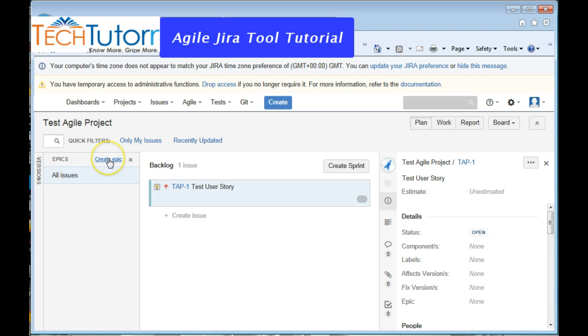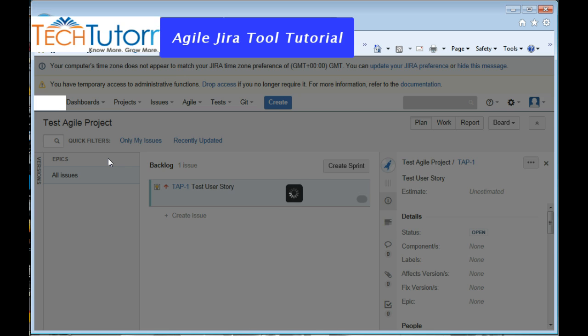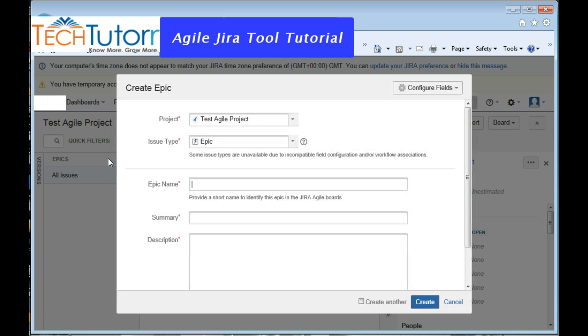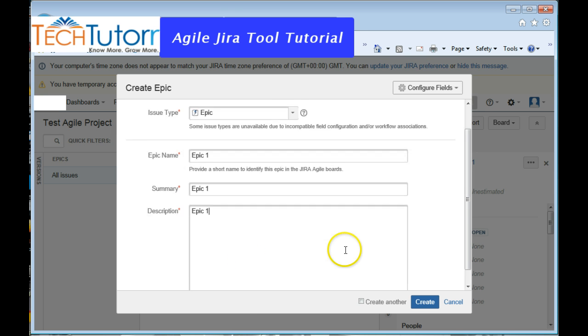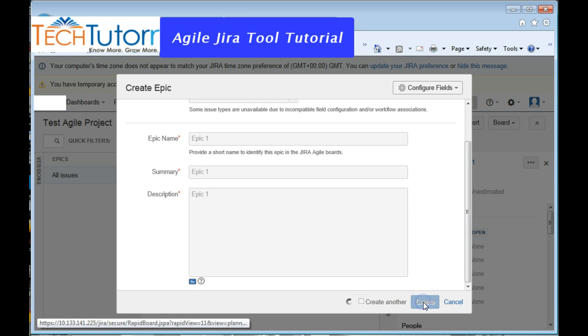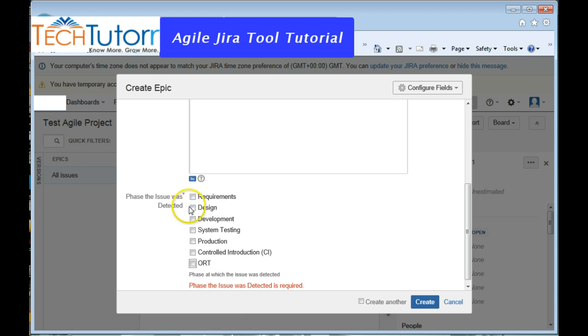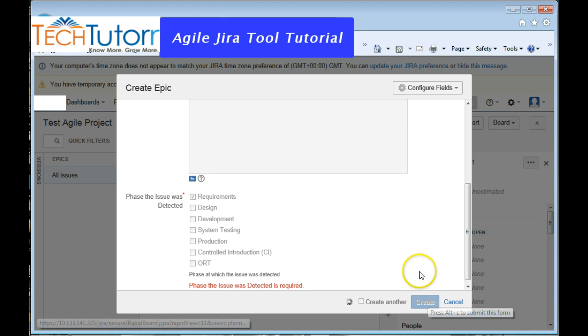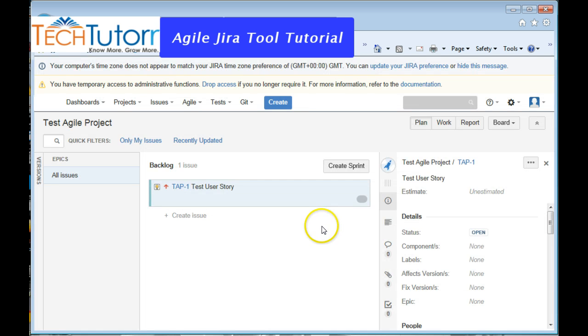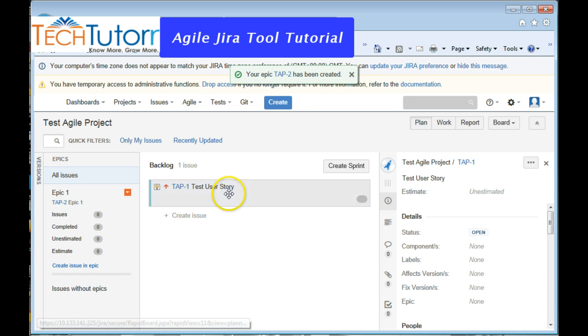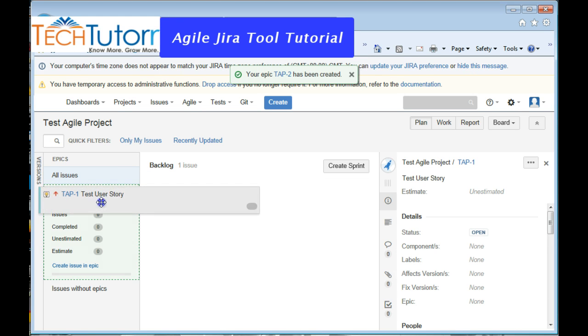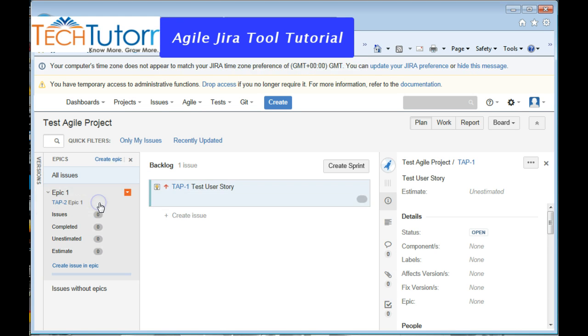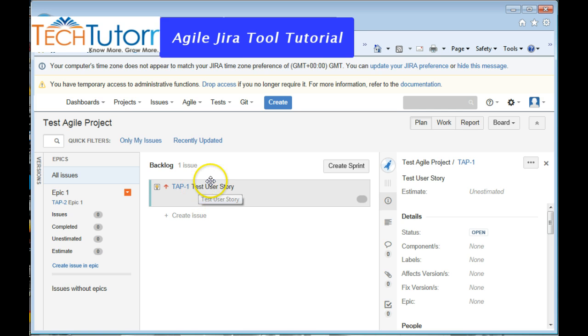And that's how we create a user story. We can create an epic under Epics—you will see Create Epic, just click on Create Epic and we'll just create an epic for the user story. So I'm just going to use a simple epic called Epic 1. To assign the user story to the epic, click on the user story and just drag it on the epic and release it. Once you do that, you will see that this particular user story is now associated with Epic 1.